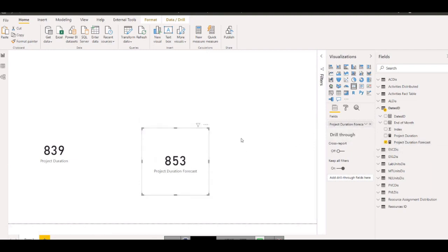Now we want to calculate the project elapsed duration. So I will not be using this as a measure because I don't want to use this. I want to compare through the baseline, but if you want, you can calculate for yourself from the forecasted date. The forecasted date can be changed in every update, so they are variable. So I will be working in this whole training based on the baseline dates. So now I'm going to calculate the project elapsed duration based on the baseline dates.